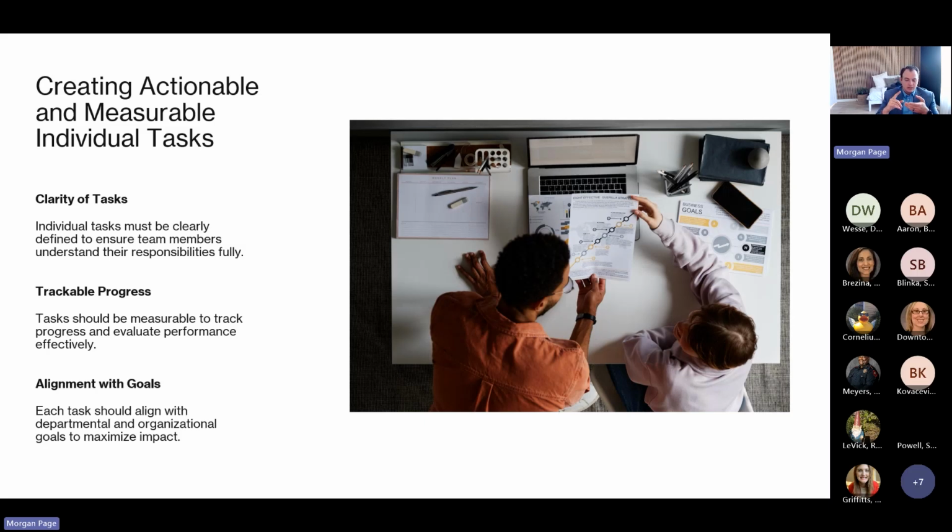Say, identify stakeholders, schedule a meeting, gather alignment, and then finalize next steps or finalize understanding, or however you want to document that. That gives you four very clear steps and activities of success as part of that task.